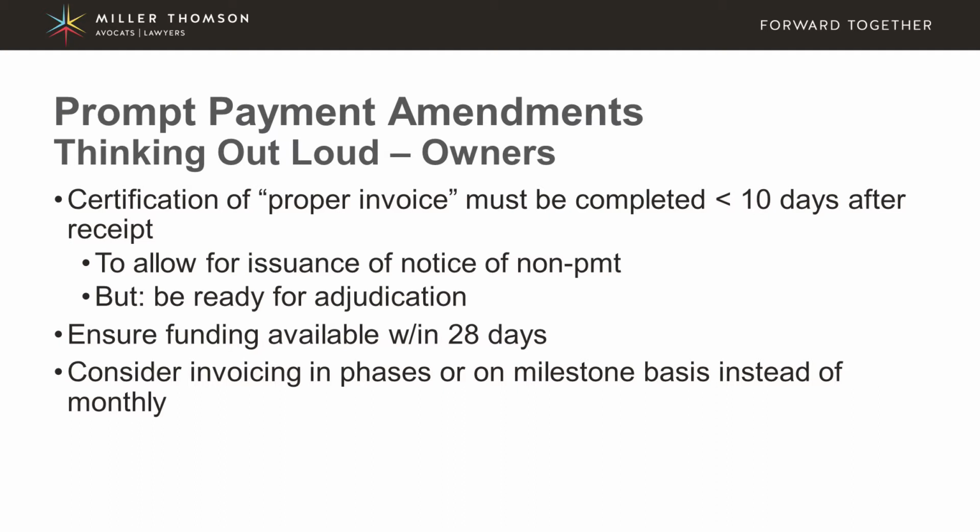If the owner doesn't object to the proper invoice or portions of it, then the other significant change is that the owner must be ready to pay that invoice within 28 days. That's typically shorter than the time period that owners currently pay invoices. Usually, you've got at least 30 days, often more. So there needs to be funding available and ready to be dispersed within a 28-day period.